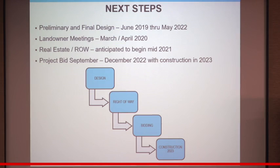And then we really get going in 2023. Travis Stressen with the DOT and the folks at the area office will be building this project as they normally do. I'm not saying that there won't be some cleanup work in 2024, which there usually is, some additional seeding and sidewalk activities, but the bulk of the work is going to take place in 2023.